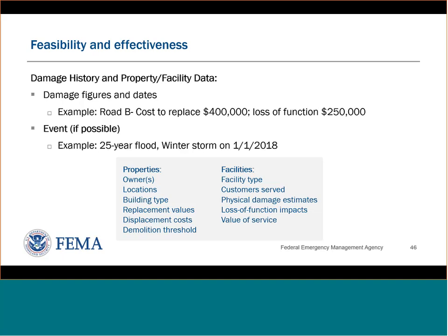The damage demolition threshold for the most part is considered to be 50% damage to the structure, meaning it's not repairable, but some communities have established codes with a different threshold, so you need to be aware of what those are in terms of your community or your county.